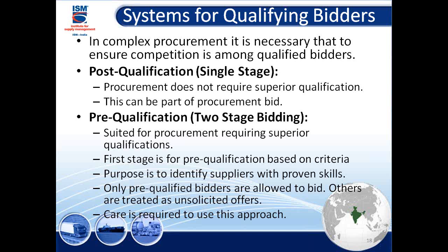Very commonly done for civil works. You can imagine if pre-qualification is not done, you get tons of bidders who have never done the building, who have never done the highways, but they come with the lowest price. It's very difficult and sometimes becomes too political. So it's always good to pre-qualify them, whether they meet the expectations or not. And then when you do the real bidding part, it only goes to qualified suppliers.